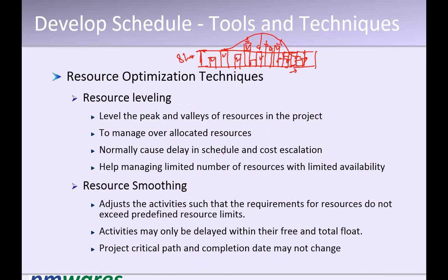But in case of leveling also, if we are on the critical path and have zero float, in that case it will also increase the duration, and the cost as well. That's what I'm saying. Whenever you do resource leveling, chances are that it will increase the duration. In 99% of cases, you will get an extended duration.